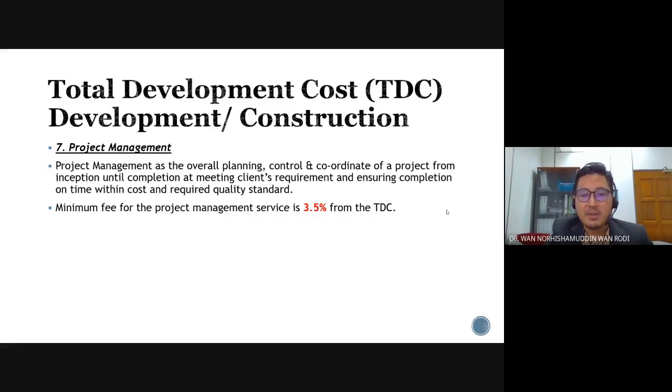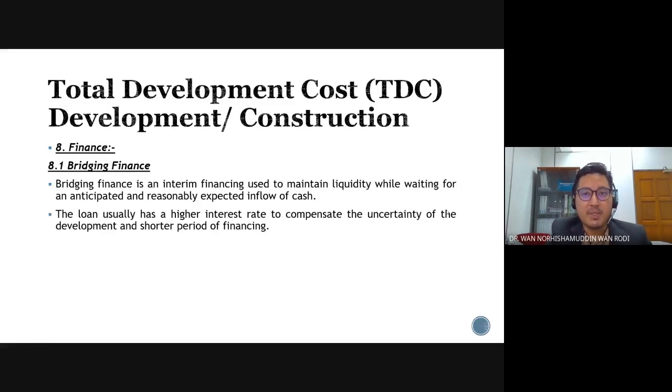Okay, another part that is quite important within development costs or construction is the bridging finance. So what is bridging finance in construction? Bridging finance is an interim financing used to maintain liquidity. Some of the developers need to have cash at hand to pay for the construction cost. So what they can do is approach a bank that is willing to give them a loan, or money, to conduct the project, and then they will pay all the construction costs using the bridging finance.